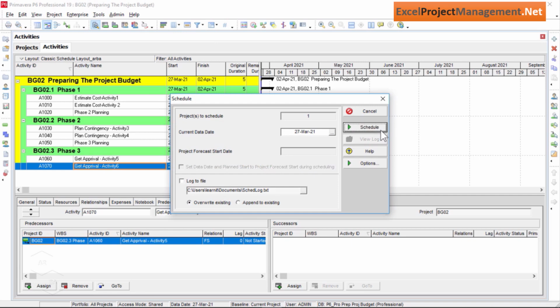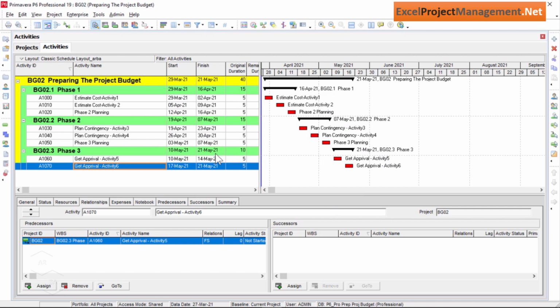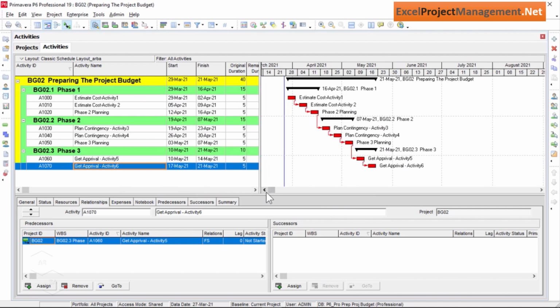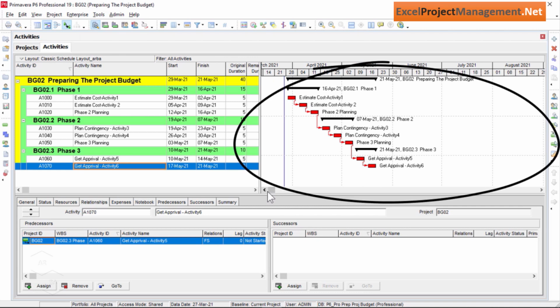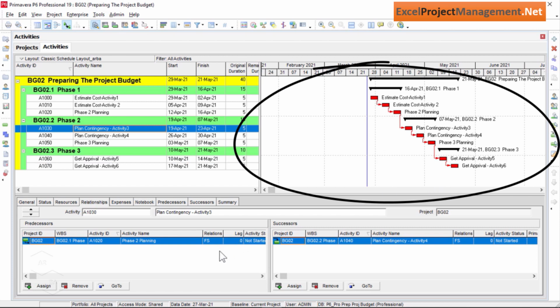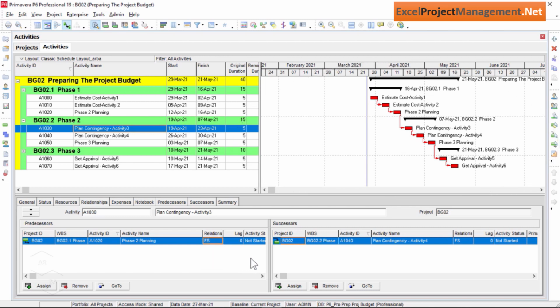And as you see, immediately after this, we see the finish to start relationship appear between our project activities in the Gantt chart area. Normally this is how we can define any type of relationship, such as finish to start, finish to finish, start to start, or start to finish between our project activities as needed. So that's it about this lecture. Let's move to our next lesson now.